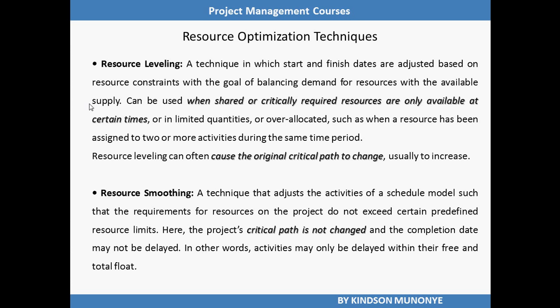Can you figure out the difference between resource leveling and resource smoothing? Yes. Resource leveling causes the original critical path to change. Resource smoothing, the critical path is not changed.